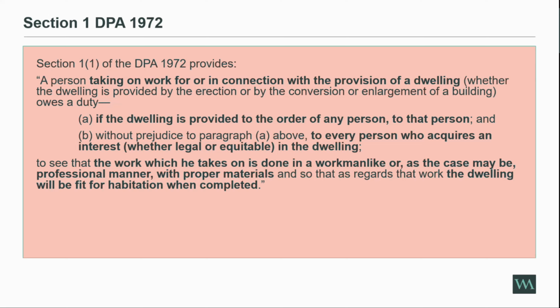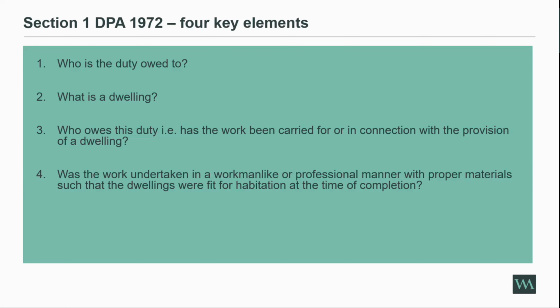They owe a duty, if the dwelling is provided to the order of any person, to that person, and to every person who acquires an interest, whether legal or equitable, in the dwelling. And the key bit is that they need to ensure that any work which they take on is done in a workmanlike, or as the case may be, professional manner, with proper materials, so that the dwelling will be fit for habitation when completed.